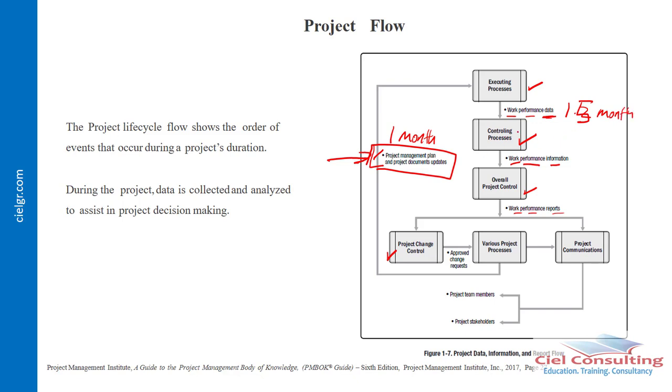So we now do the controlling where we check, and that's why I said you compare the data against the plan. When you do that, it simply tells us that we are 2 weeks behind schedule. So this 2 weeks behind schedule is now what we refer to as the information, because you can see the data now has a meaning, which is essentially what we have explained here.